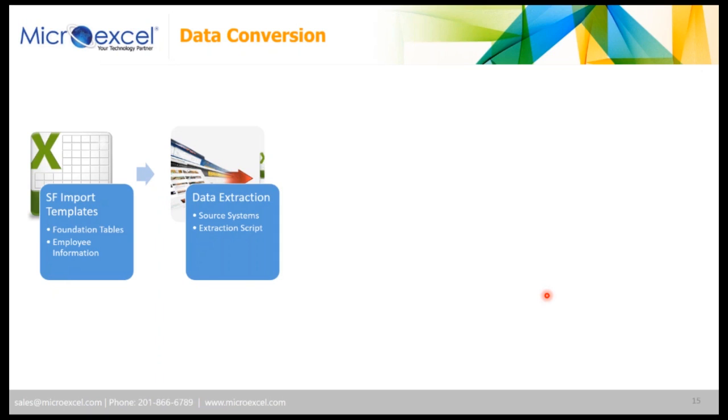Of course, you will have to extract the data from your source systems. You have to have extraction scripts because you're going to run through several iterations of data conversion, and you don't want to redo everything all the time. So you really need to save your queries or your scripts to be able to rerun them at different times.